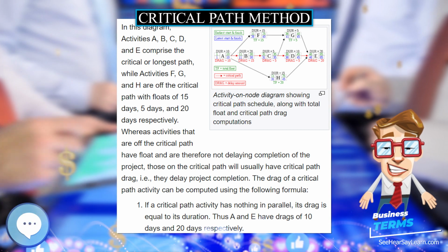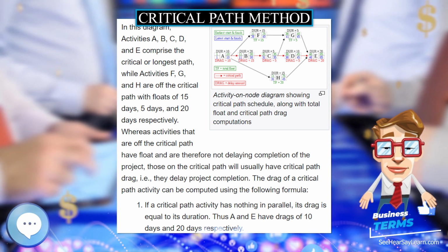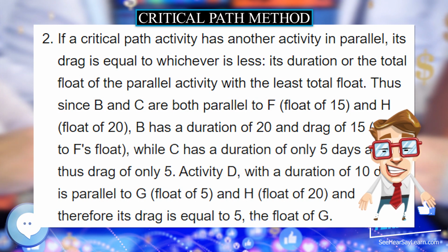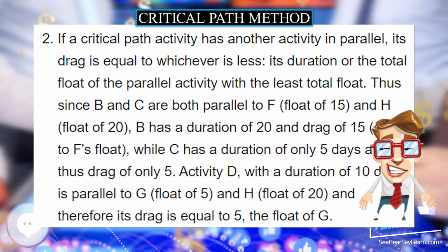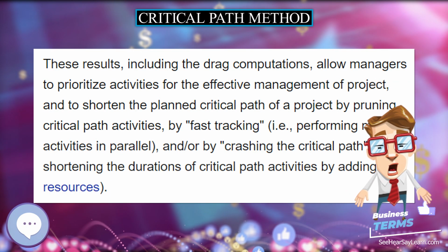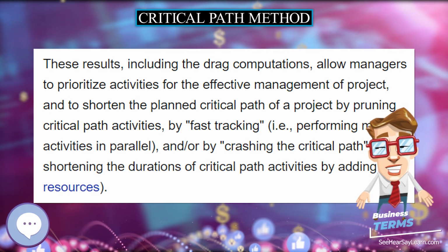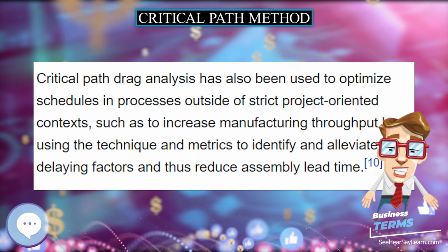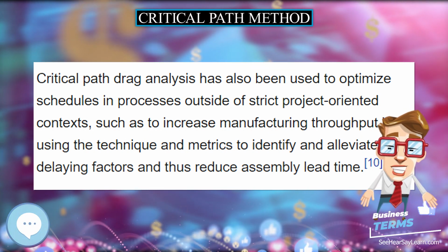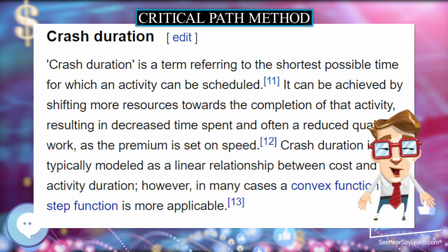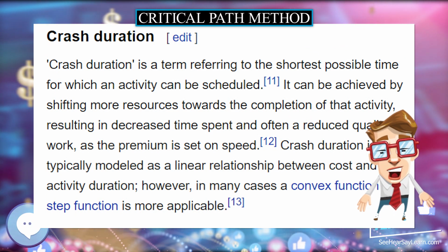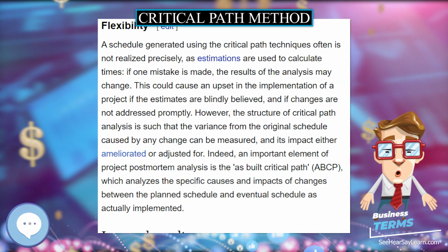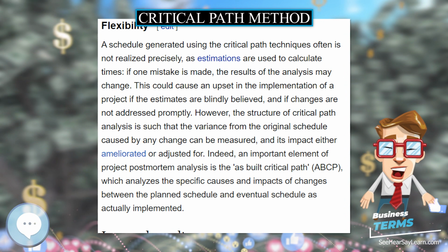CPM analysis tools allow a user to select a logical endpoint in a project and quickly identify its longest series of dependent activities, its longest path. These tools can display the critical path, and near critical path activities if desired, as a cascading waterfall that flows from the project's start, or current status date, to the selected logical endpoint. Visualizing critical path schedule.